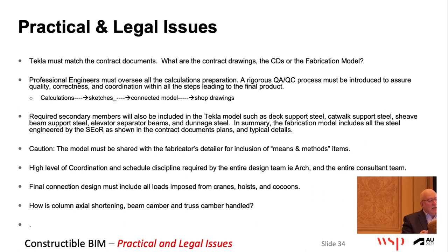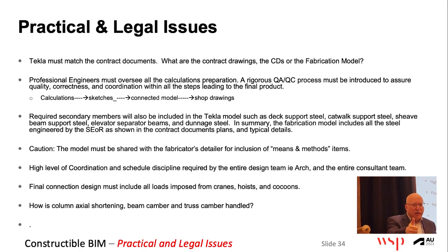It's changed over the years, but every job's the same. What's the contract documents? This client was very smart. At the very end, he said, okay, anything you issue, I expect 2 issuances at the same time. Contract document, which is the Revit model updated, TECLA model updated. They always have to be both issued at the same time, so no one can say, I found it on the TECLA model, I didn't find it on the Revit model, or vice versa.